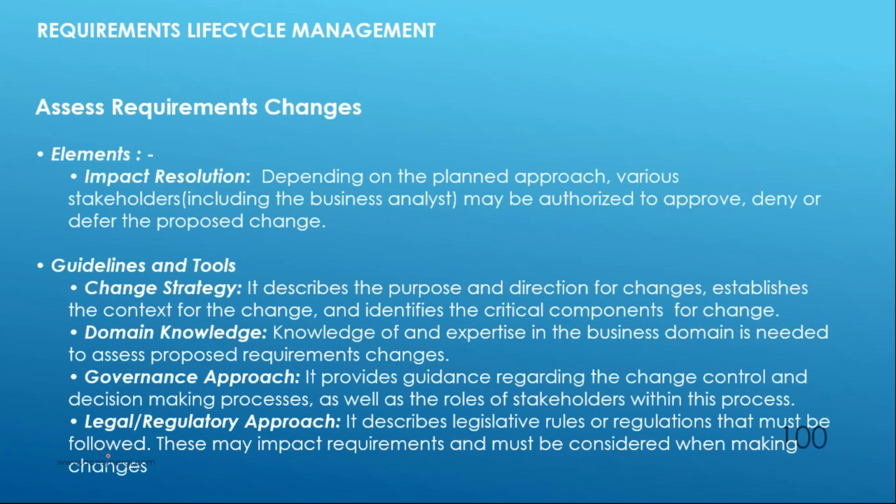CR, when I say change request, you may either approve it, deny it, or defer the proposed change. These are the possible courses of action that you can take for the changes which have been requested. They may be authorized to approve, deny, or defer the proposed change.